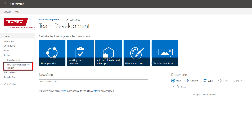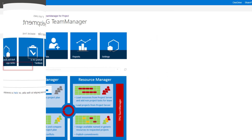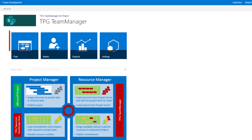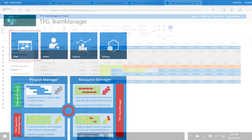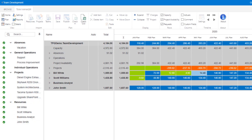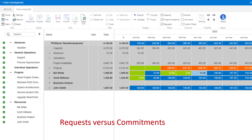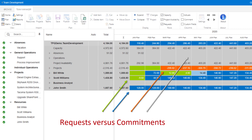The TPG Team Manager homepage within the SharePoint team site hosts the four functionalities that we can navigate to. Here in Plan, this is where we typically invest the majority of our time. Color ranges from blue, which is available; green, where requests equal commitments; reddish-orange, where requests have not been fulfilled; and gray, where there are no values to be displayed.